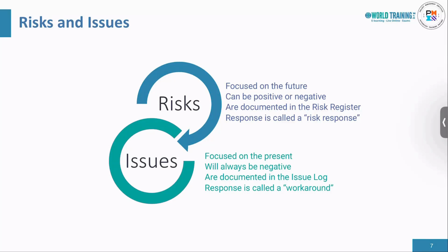Next, issues are recorded separately from risk in the issue register. Issues are documented in the issue register or issue log. In the issue log, we track the issue owner, opening date of the issue, target date for closure, with whom the issue is pending, intermediate updates available on issue closure, criticality of the issues, and its impact.